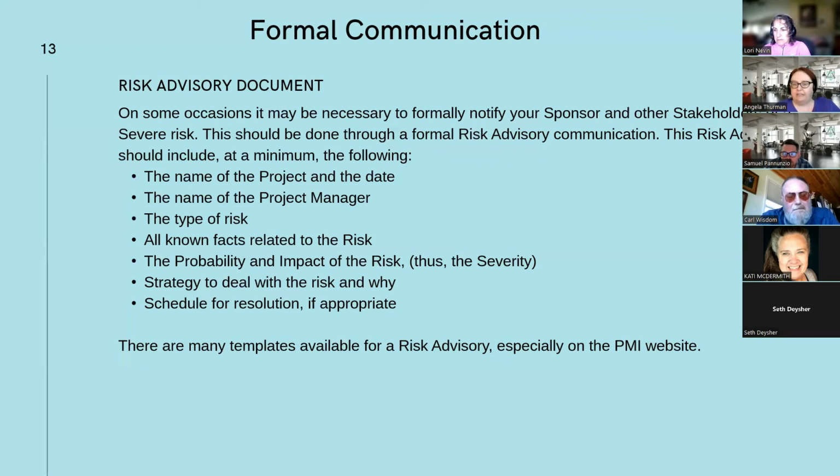So what is the relevant information that you have at the time, the probability and the impact of the risk, so that's the severity, the strategy to deal with the risk, and why your team has selected that strategy. So you want to provide a solution if you can, and then the schedule for the resolution if it's appropriate. So if you're simply just going to accept the risk, then there's no resolution.